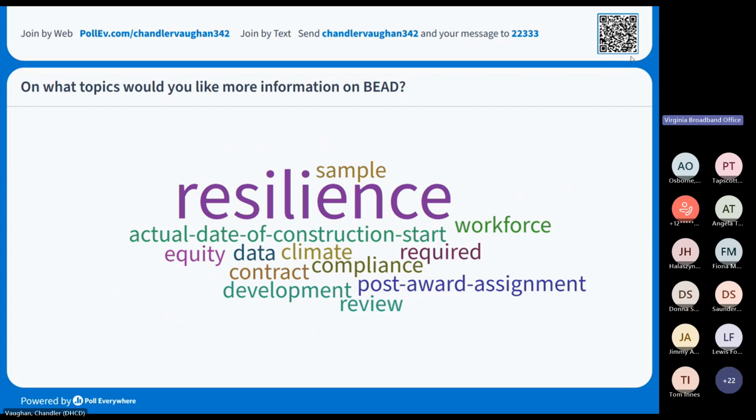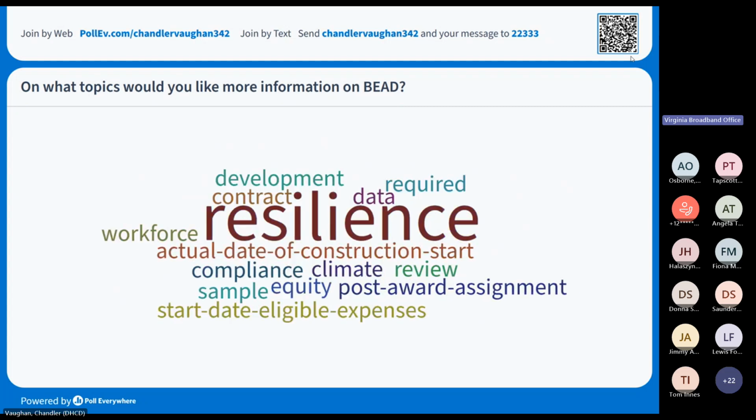Looking forward, the timeline and schedule from here on out, of course, we have the 90-day application process wrapping up on March 1st. We will then, after that, launch that 30-day application window, probably starting sometime in the month of April. We would have awards announced around the time of June, and then that final proposal submitted to NTIA by July 25th of 2025. That's the development timeline of getting to the point where we recommend awards to NTIA.